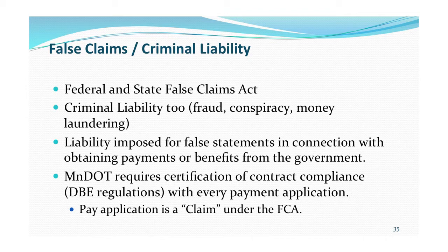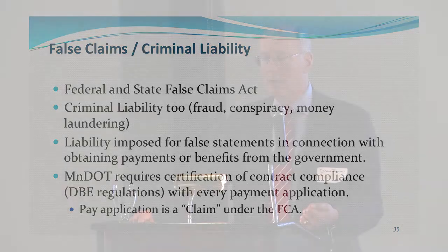Well, what's a claim? A pay application is a claim. But every pay application now, according to the new MnDOT specs, says you must certify with every application that you are complying with all laws related to this contract. That means the DBE laws. So with every pay application, you're certifying that your DBE contractors possess CUF and that you're making good faith efforts on this job to increase your DBE participation. So they've now implied False Claims Act liability in every pay application.